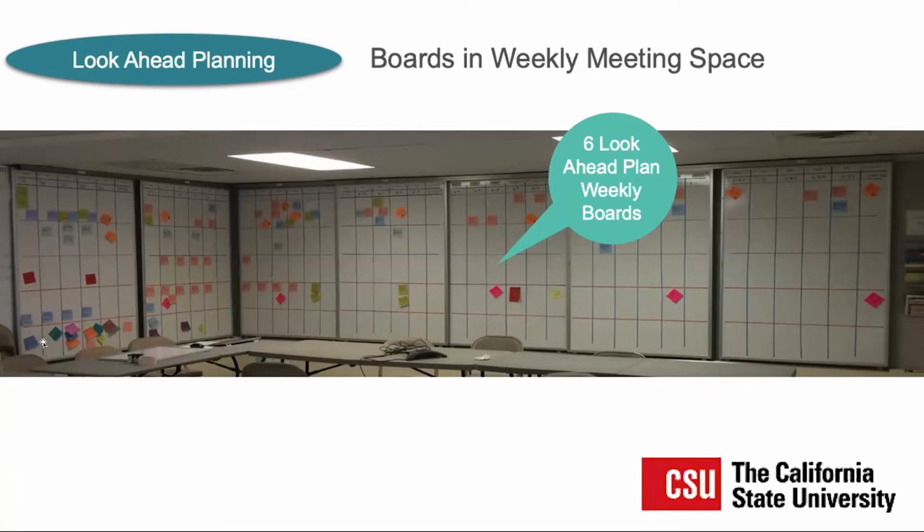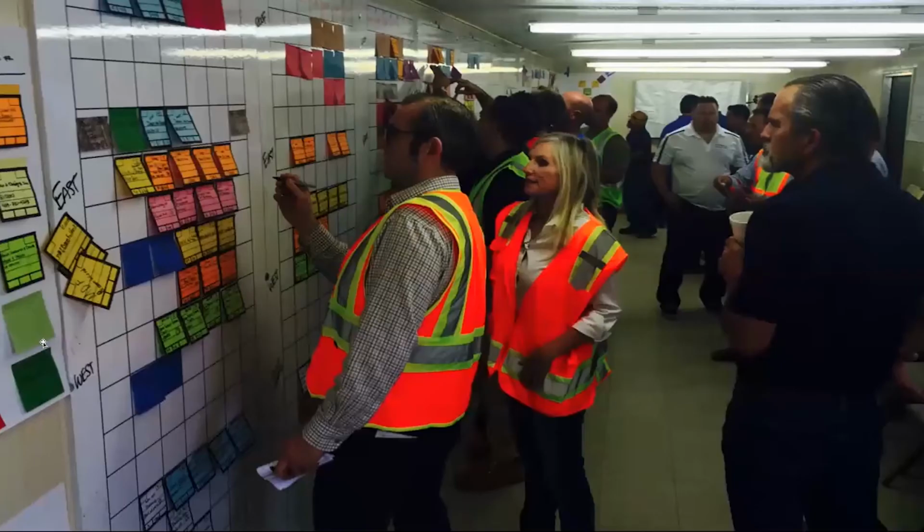The other point to note is that when you're putting tags on the board, whoever owns that activity should put their tag on the board, because if someone else moves it or does it on their behalf, it's not their commitment. So that's an important thing to keep in mind.